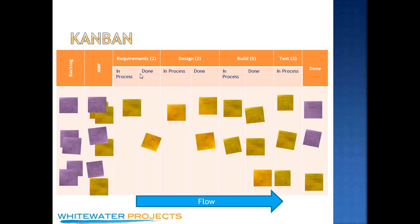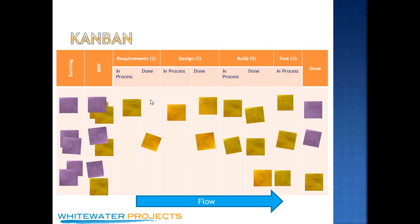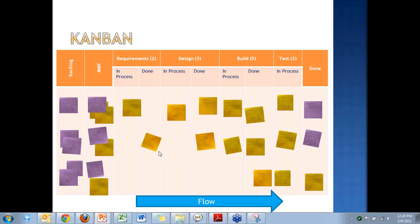This person has two pieces of work they're limited to. Only when the design people pull one in can the requirements person now pull another card in. If they move one over to done, they're waiting — they're stopped. As an organization, we have self-imposed this rule that says only two pieces of work in progress at any time. There are lots of good reasons for that. If you come to the class, we can go over why that works.